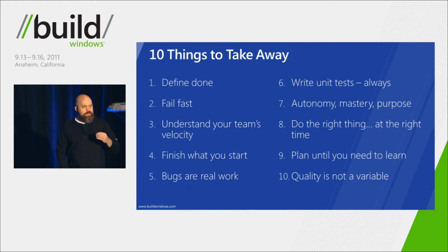You always want to make sure that you start an activity, whether it's a task or a story or a sprint, and finish it before starting another one. We've often seen, in addition to the half-a-person problem, this thing where we spread ourselves too thin. We peanut butter ourselves across the product backlog or across the task list. And we take on 10 or 12 things all at once, and they're all running in parallel like this, and we get to the end of the sprint and none of them are done.